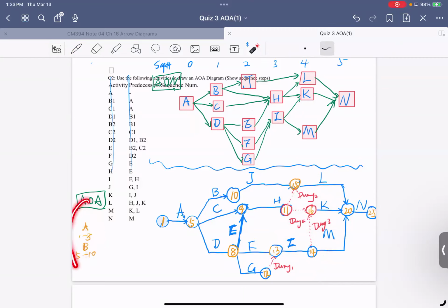And also there is nothing over here sharing the same combination of 1 to 5 or 5 to 10. Okay? Could A be 0 to 5? You can do 0 to 5, and you can do 0 to 10. It doesn't matter. But you don't need to do the 5 gap. You can do the 10 gap.